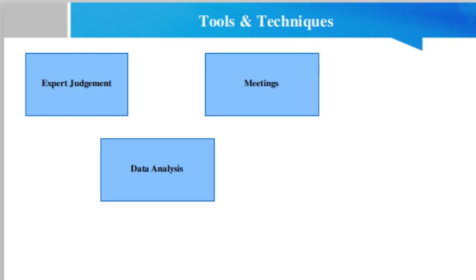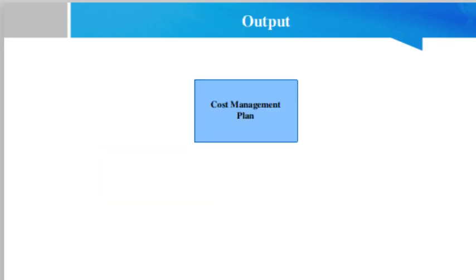The data analysis technique that can be used for this process includes, but is not limited to, alternative analysis. Alternative analysis can include reviewing strategic funding options such as self-funding, funding with equity, or funding with debt. For meetings, project teams may hold planning meetings to develop the cost management plan. Attendees may include the project manager, the project sponsor, selected project team members, selected stakeholders, anyone with responsibility for project cost, and others as needed.